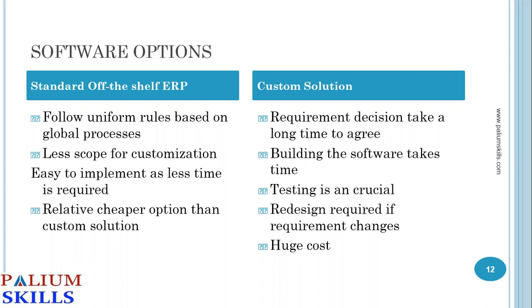So most of the customers would always be getting a custom solution, right? Yes, but there are downsides of going for a custom solution. One, freezing on the requirement takes a long time. The moment people realize that they can get what they want, getting people to understand what you want is important. It never freezes. Yes, it never freezes. Testing is another very important piece, right? The more you test, the more bugs, and taking care of the bugs and all that takes a long time.